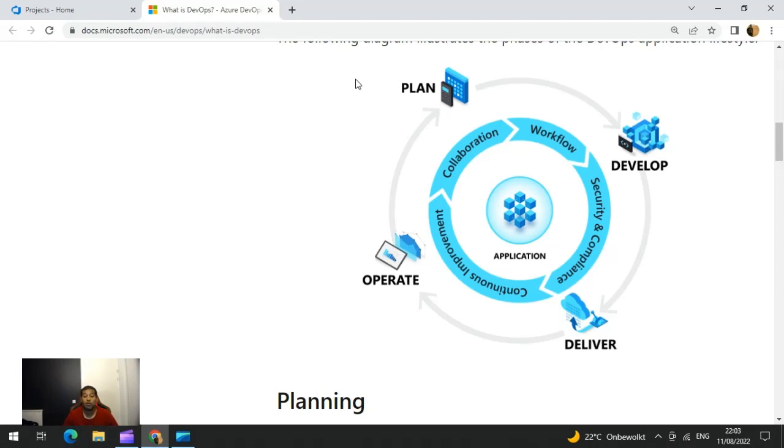For example, when you talk about Scrum, in Scrum you have the daily stand-up meeting, so that your team members have the opportunity to collaborate every day and give an update about what they are doing, and this will help the other team members to give some ideas and also deliver your project quickly. And the best part is you're continuously having a look at your product, and there is an opportunity to improve at every corner by your team members.